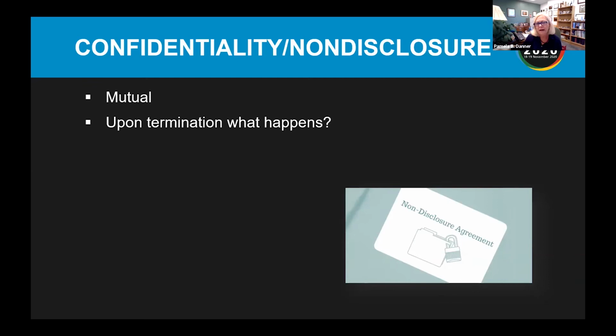Upon termination, what happens? Each party should hand over or destroy the other's documents upon request. But it is my opinion that confidentiality should survive after termination. Many contracts have a number of years stated for survival. I would suggest making that as many as possible or indefinite.